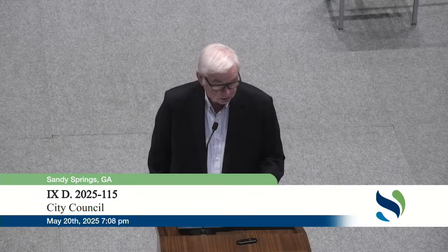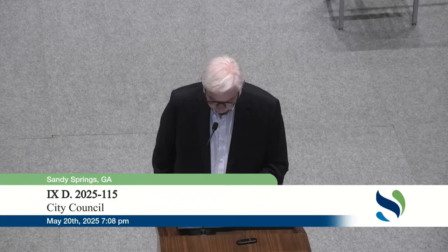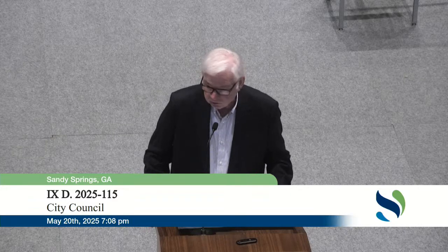There are sufficient funds available in Project T3000 to award this contract, and the staff prepared estimate for the project is $7 million, as was the recommendation with the PCI survey last year of a $7 million annual investment to maintain an average PCI target score of 80. With that, Mayor and Council, I'll conclude my presentation.